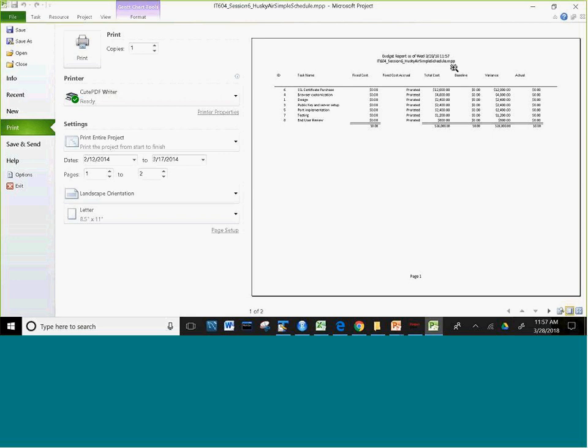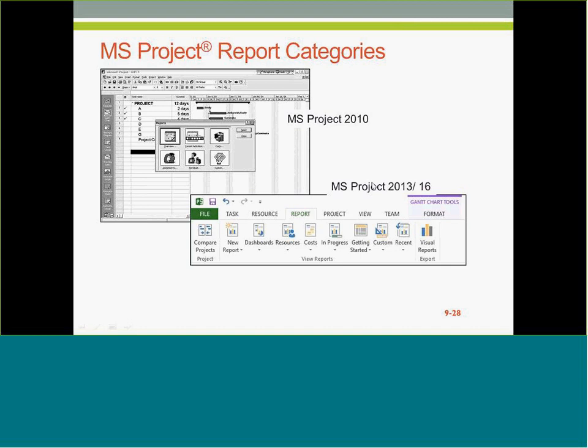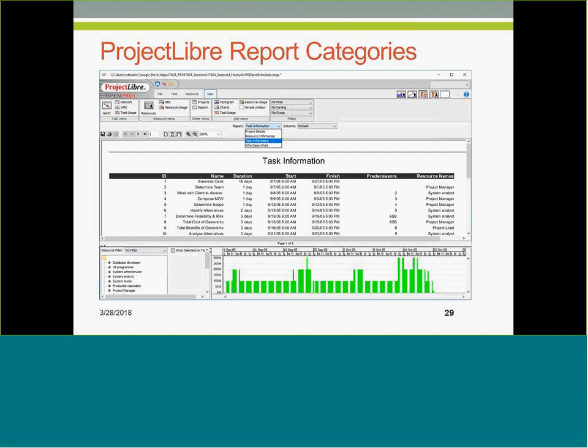So, right, and depending on the version of Microsoft Project that you have, in 2013 and 2016, you have a report tab, and these reports include dashboards that you can build, graphic dashboards. Remember, I talked about the importance of graphics, right? Those are right there as well. So in progress, you have reports in a different place. You go View tab, then you select a report, and then from the report, you can find all sorts of different reports. I'll show you that as well.